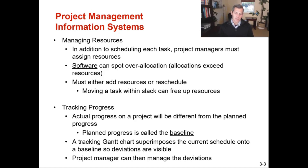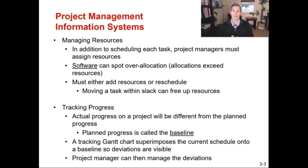One of the best things that project management information systems do is track progress. We've got a baseline. For Milwaukee Paper, the baseline was 16 weeks to complete the project, and we believed it would take 15 weeks. If things are going well, maybe we'll complete it in 14 weeks; if not, we know there are activities we could potentially crash to bring us back on track. A Gantt chart shows the current schedule versus the baseline, and project managers can work to alleviate deviations by managing the team to make sure the project stays on track.